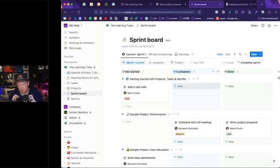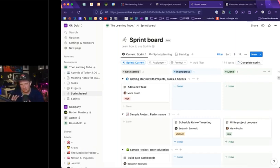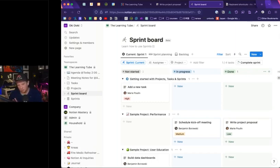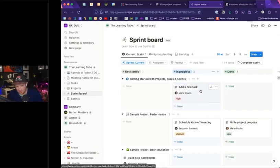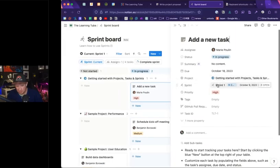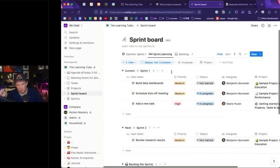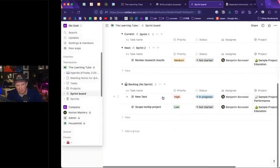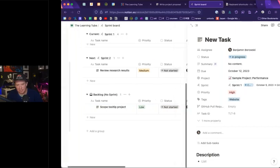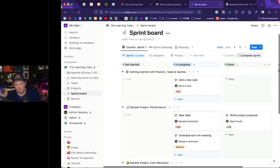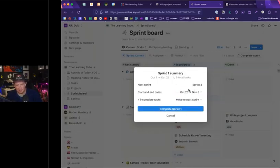The sprint board is a newer thing in Notion. I could build this entire system from scratch by creating databases, but a sprint board is something you can't fully replicate from scratch. In agile workflow, sprints typically last about two weeks — you commit to doing specific work in that two-week period. Tasks in a sprint are assigned to a sprint — for example, 'new task' is assigned to this project and is also part of sprint one. You can move tasks to a sprint using the sprint planning view, where the backlog shows tasks with no sprint. Move them to sprint one, do your work, and then click 'complete sprint.'